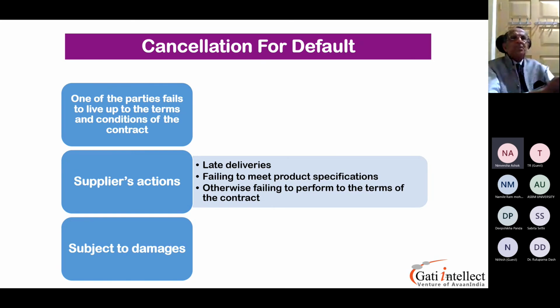You can say you have stipulated in the sales contract, this is the product specification you're going to provide me. Now what you have provided is totally different. So it's a breach of contract. So I have every right to claim for the loss of revenue I've incurred, my opportunity cost. You can come up with all kinds of claims, provided it's in the contract. That's the most important part. So legally, you can put a claim on the supplier.